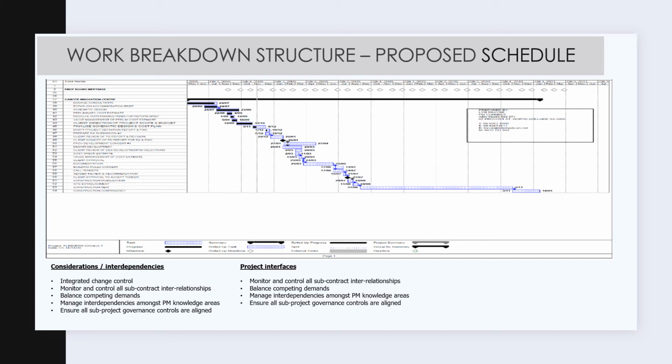The successful adherence to their sub-project schedules will impact on the commencement of sub-project 1 scheduled tasks, which will cause a flow-on effect and also impact on performance measures. To note is that sub-project 1 is not going to have continuous workflow, as the site works and landscaping will be last. Scheduling software needs to be considered, as is ensuring that all sub-projects are using the same software to